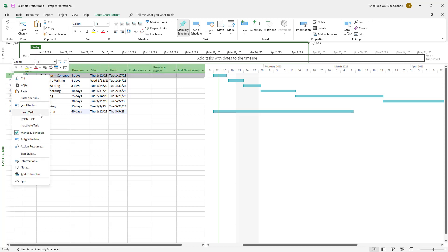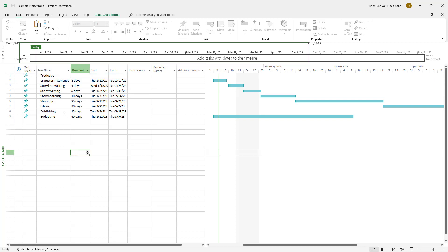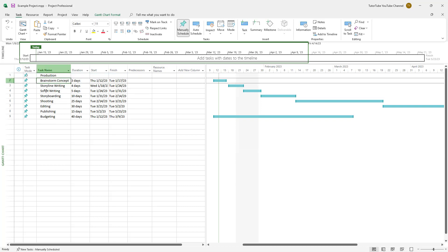I'm going to click on 'Insert Task' at the top and name it 'Production'. All of the related tasks are going to become subtasks of this. I'll select them by clicking the top one and shift-selecting down, then head over to the Task tab.